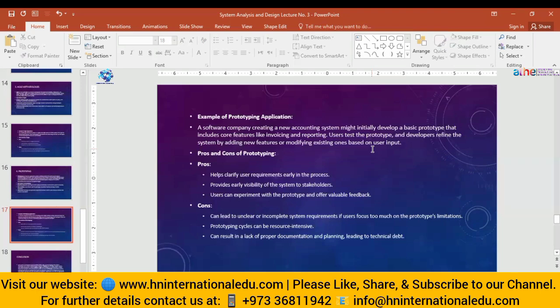So sometimes the client doesn't know, they just say that, okay, I need an e-commerce website. They don't know anything about this, and you have to ask different questions. If they don't get any idea and you don't know how to get requirements from them, you can show them your previous work. You can show them samples, like these are the samples which we have previously made. So these are the different options which we will add in your e-commerce solution. Okay, he will check, yes, this option, okay, done.